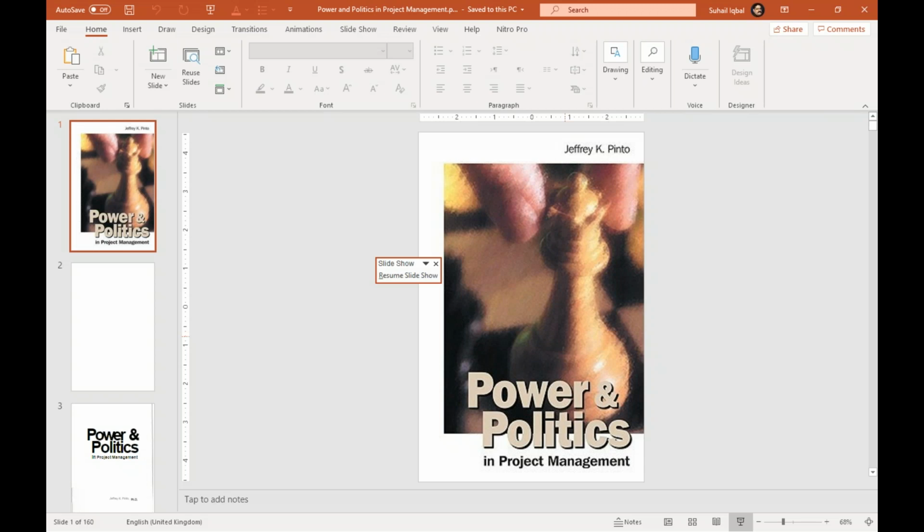So taking them one by one, assess the environment, the very first step. This dictum implies that project managers must realistically determine the likely operating environment for administering the project. Is the project relatively low-key and not likely to attract attention, or is it quite significant? A large computer manufacturer recently undertook to develop a new line of mainframe computers and storage units that could potentially lead to great profits or serious losses. In that environment, the manufacturer took great care to first determine the need for such a product line by conducting market research with corporate